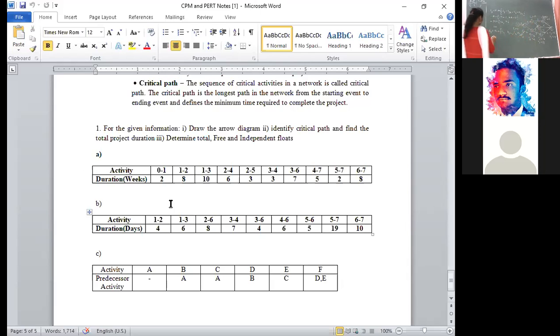The L4 value you have already calculated, that is 22 minus T24, that is 6, and L5 value is 25 minus T25, the value is 3. Correct, students? Minimum of 16, comma, 22. The minimum is 16. That means the L2 value is 16.